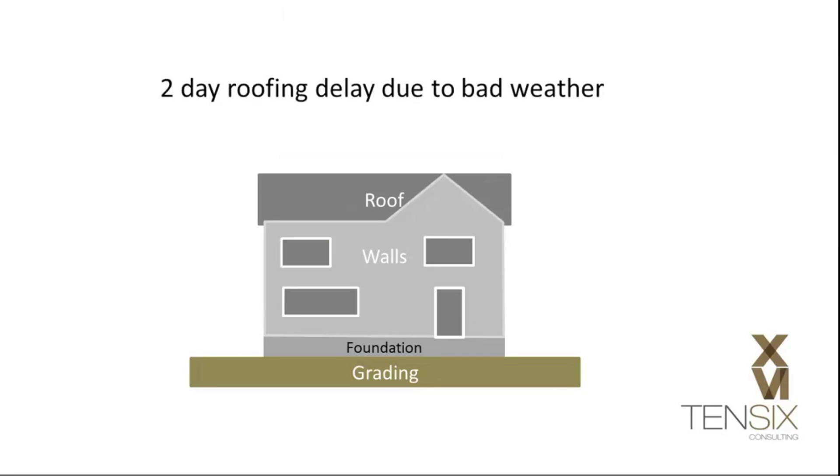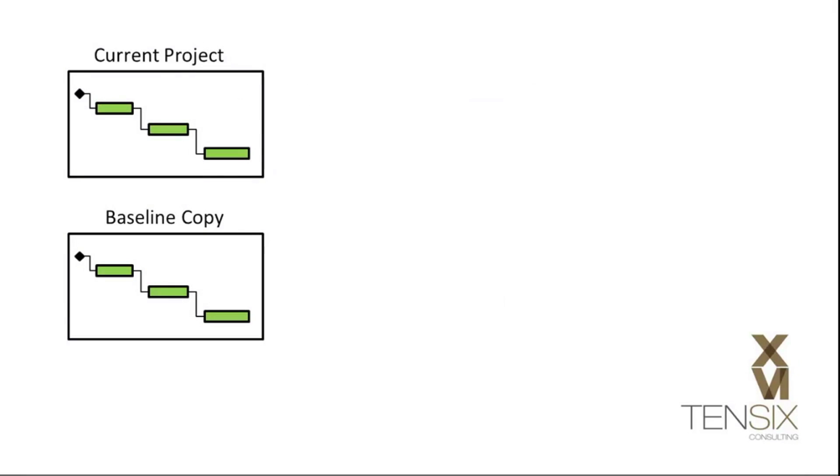In P6, you can create an unlimited number of baselines and can assign up to four separate baselines per project.